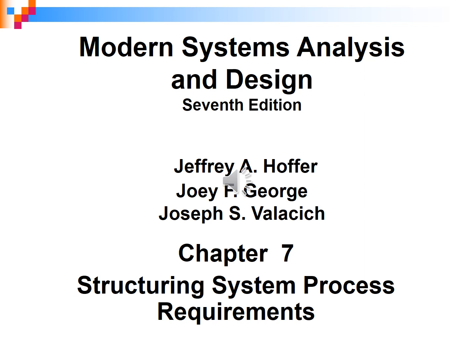Then after that we went to collect requirements. Actually, before collecting requirements, we built the baseline project plan, which has all the information. We presented it to the customer, and when we presented it, they signed it, and now it is an official document. If everything is okay, we continue and proceed to the analysis phase. The first activity of the analysis phase is collecting requirements, or as we said in software engineering, requirements elicitation, not really collecting or determining.